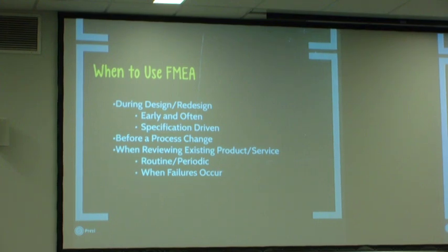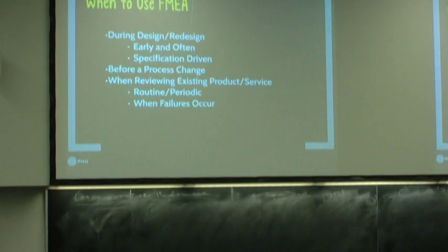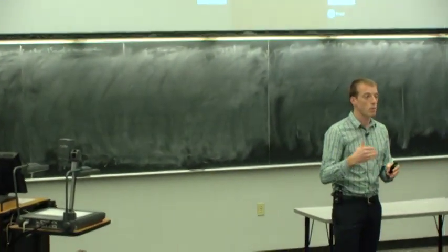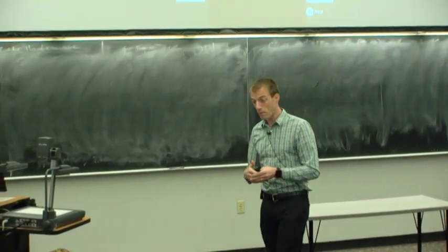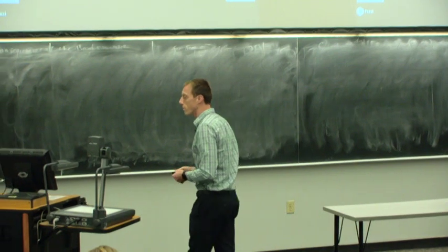When you have products that you have on the commercial market, you'll have some design control process, and usually in that process you'll say, okay, we changed the print for this part, so it's a little bit different. We need to go through and do these steps, and one of those will be updating your FMEA. Think about what could fail now that wouldn't have failed before.